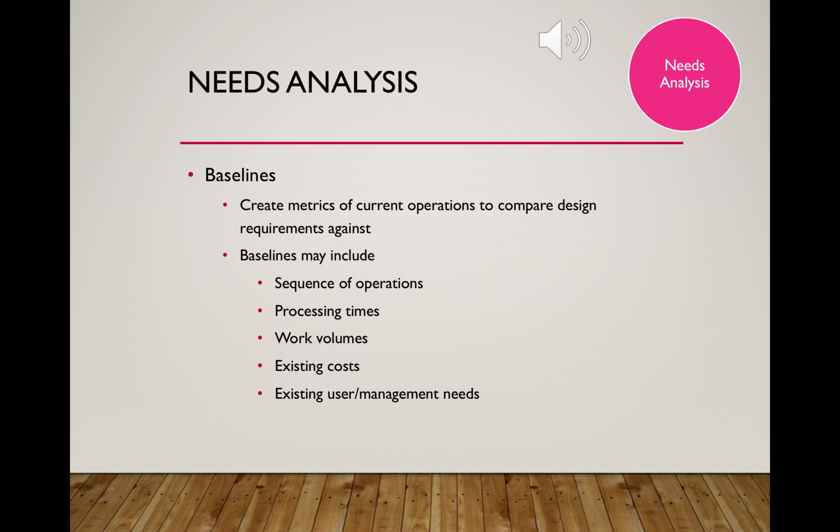So baselines may include sequence of operations, specific calculation of processing times, the amount of work volume that's able to be done, existing costs, and existing user and management needs. So you need to baseline all that and make sure that what you're trying to do can be measured. And that's the concept of baselines.